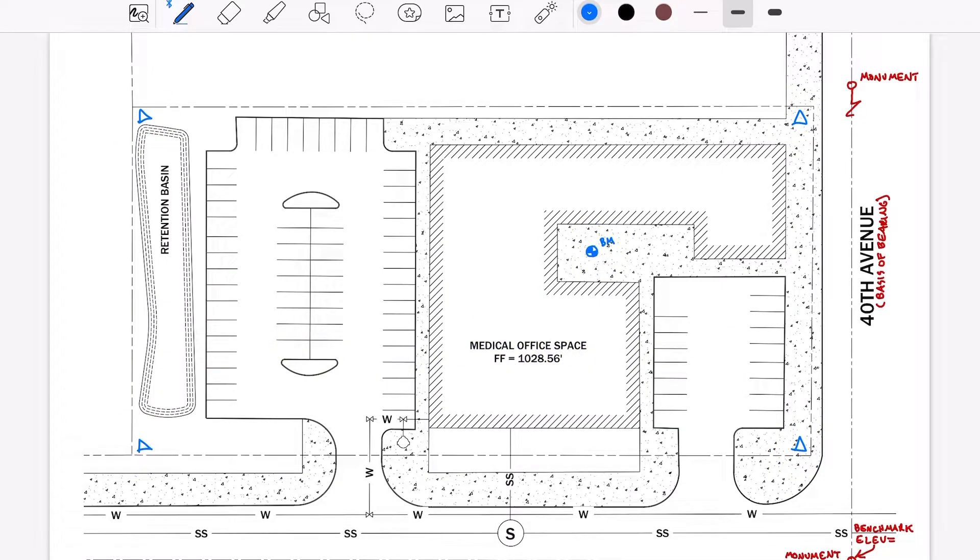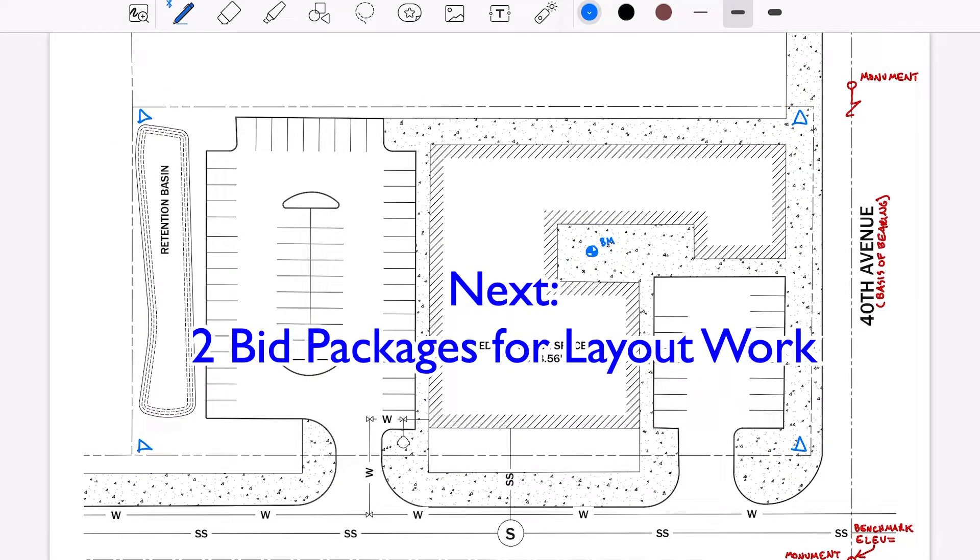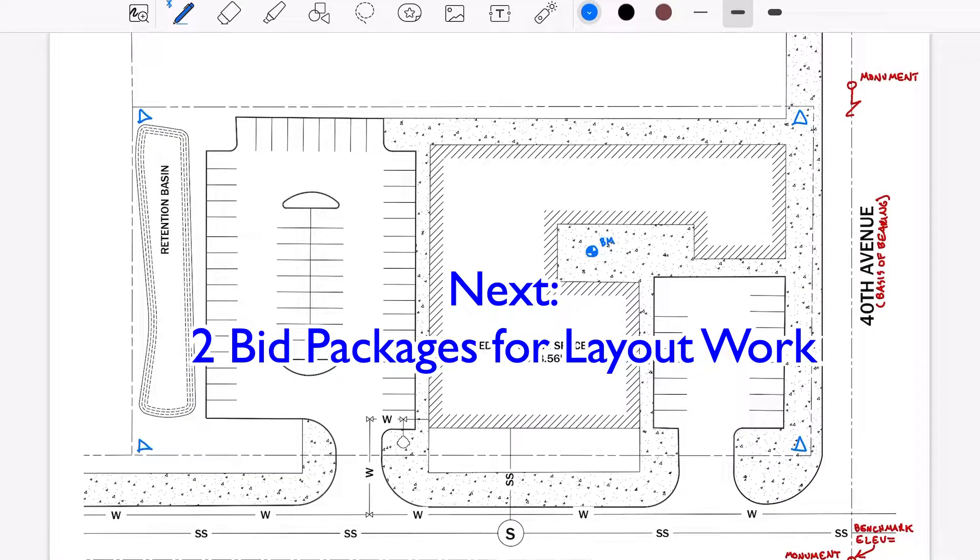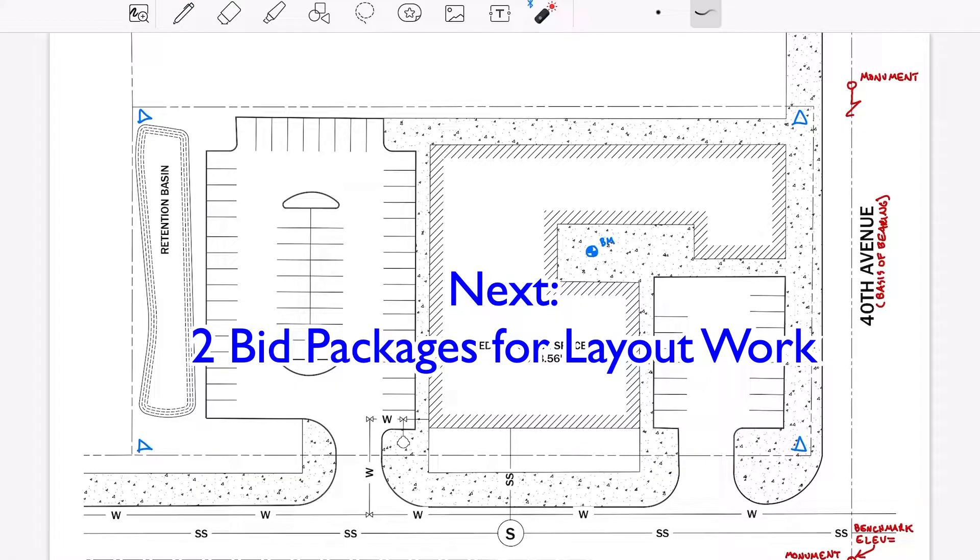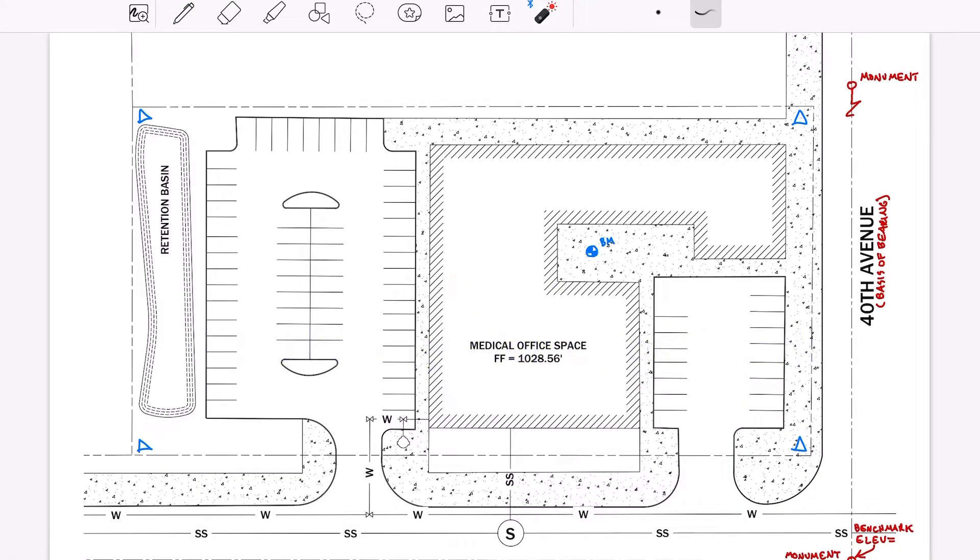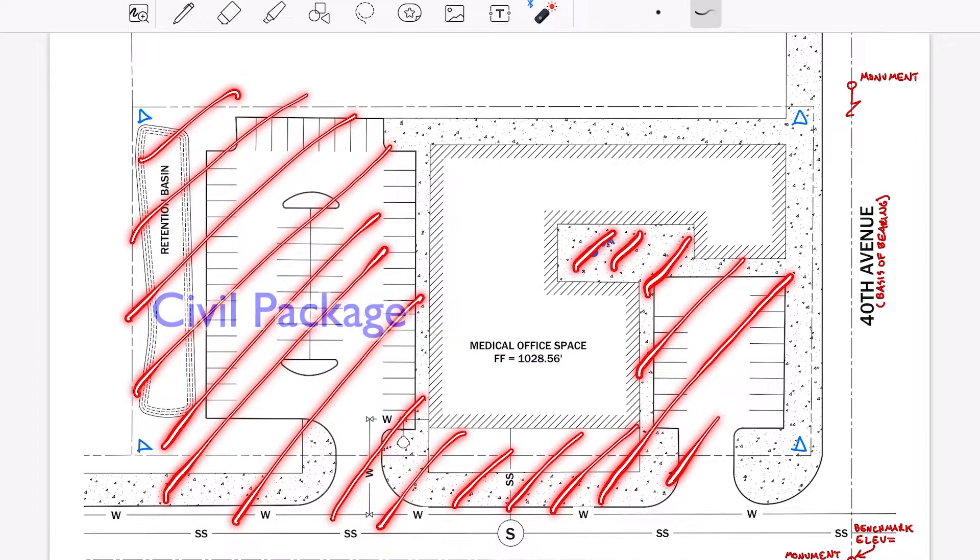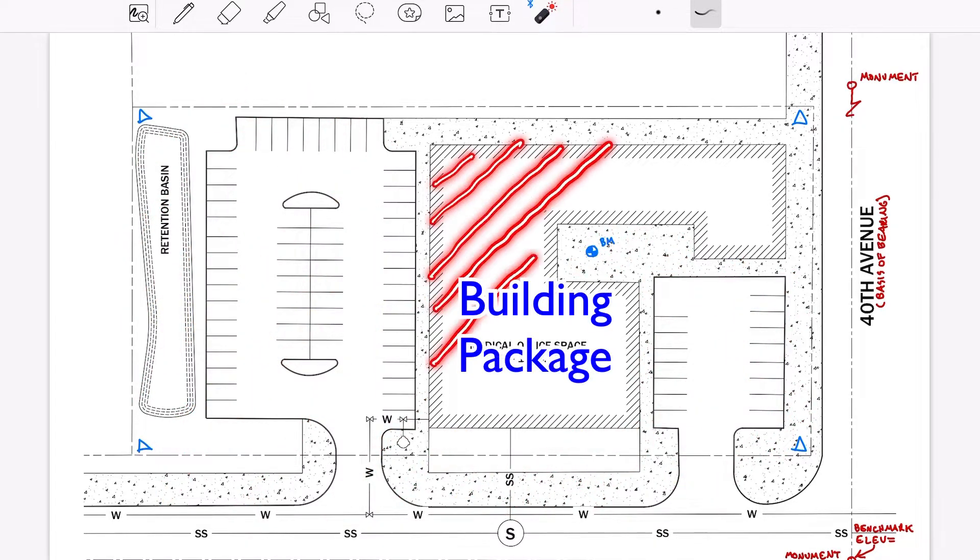From here, layout work is often bundled into two packages and each package is bid separately so that which agency is doing which set of tasks and activities is very clear. The two packages are the civil package and the building package.